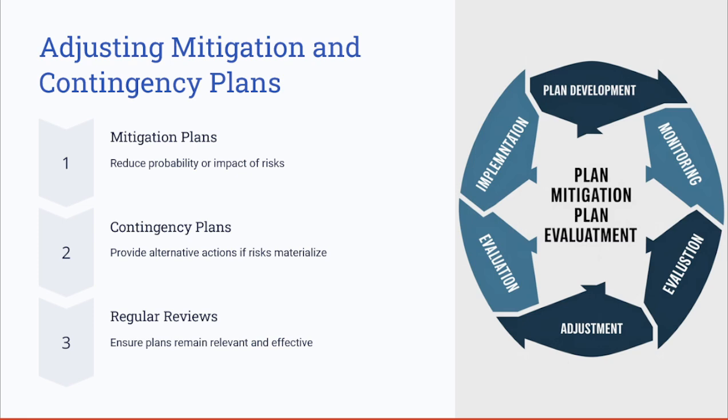Also, by extending the contingency plans, we mean extending the project schedule or timeline, or adding enough budget to accommodate these new changes on the risks. So, as a project manager, ensure a regular review so the plans remain relevant and effective.